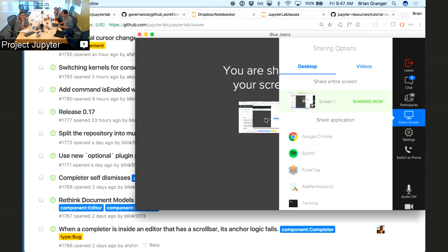Go ahead. Yeah, the way we're dealing with that right now is basically all of us, when new issues come in, we just classify them with this schema. We typically try to add a type, a milestone, and at least a component. And honestly, now that we're doing it on a regular basis, and all of our existing issues are cataloged in this way, that part of it is not too bad.